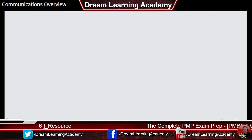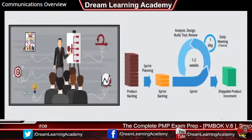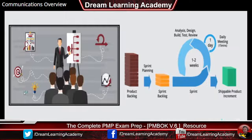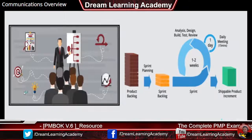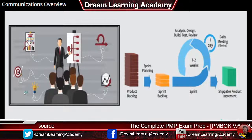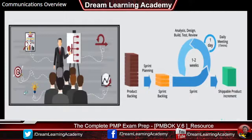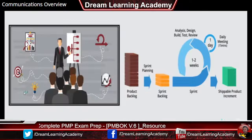In agile or adaptive environments, communication management differs slightly from traditional projects. Face-to-face communication is recognized as the best way to convey information. Agile documents are simple and provide only sufficient information. Agile teams use a 'show, don't tell' concept, showing work to communicate progress on a regular basis in the sprint review. Meetings on agile projects are as quick as possible and include only people who add to and benefit from the meeting.